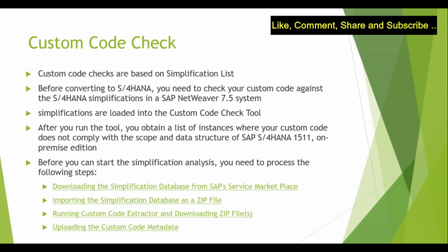So for example, out of the 25 reports, from the last 1 year, 10 reports are not being used at all. So you can keep them as a last priority. Or maybe you don't need to perform any adjustments. You can completely avoid that, because this is something which was not used for years. Right? So in short, it will tell you what the problem is, and it will tell you to refer to the SAP note in order to solve that problem.